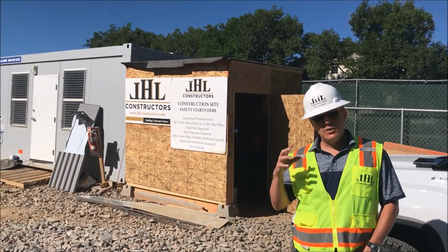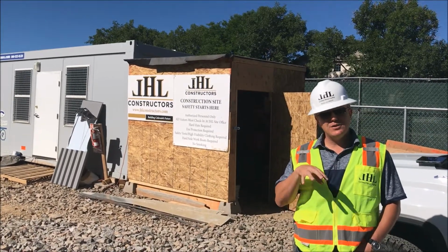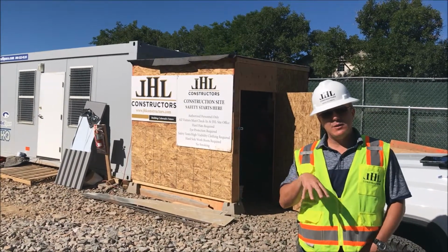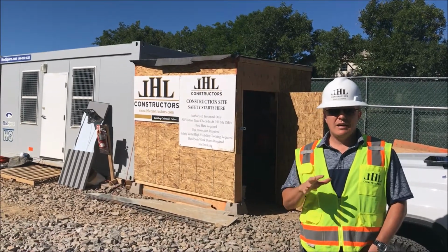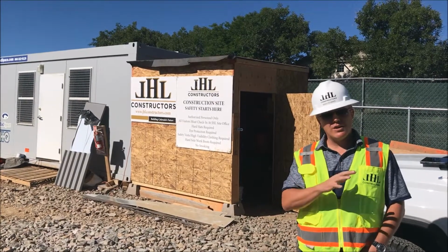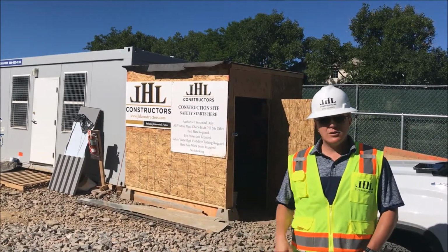So you guys are a school first and foremost, and our job site a far second to that. For that reason, we know that pickup and drop-off times are very hectic around this campus. You guys have a very tight site. So for that reason, we're only accepting deliveries for the actual construction job site between the hours of 9 a.m. and 2 p.m. You should not ever see a truck making deliveries or any sort of encumbrance on your guys' pickup and drop-off time from the construction job site.